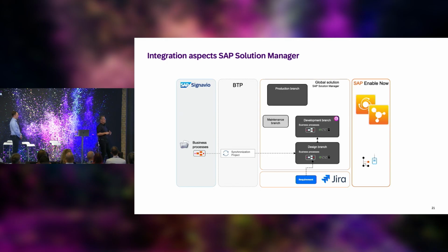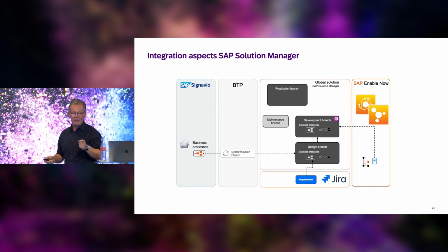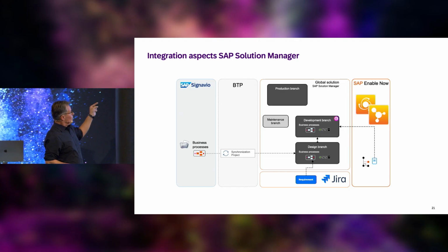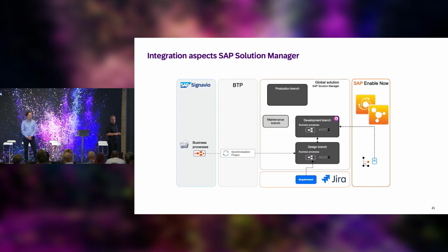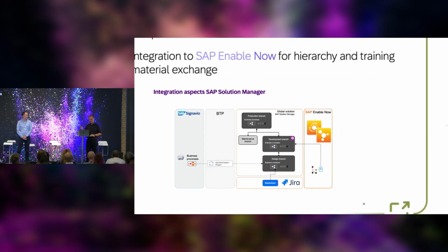And once you did the functional specification, you hand over to implementation, and implementation just puts the technical documentation on top, and you start thinking about your business, how to train them, how to tell them how you implemented it finally. But before you go live, you have to test it. And that would also be done based on the development branch version of our process. And finally, after successful testing, you would go live with that. That's the requirement to deploy process in Solution Manager.